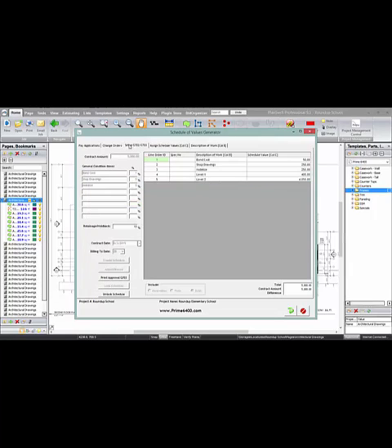After that's been completed, we'll come back here and we'll assign the contract value. Could be over or under your estimate itself, depending on your market and market conditions. We'll place in here the fixed costs up front that you would want to include for bond cost, shop drawings, mobilization. Those values would be reserved at the very top of the schedule of values, and they would be a true percentage of what the contract amount is.